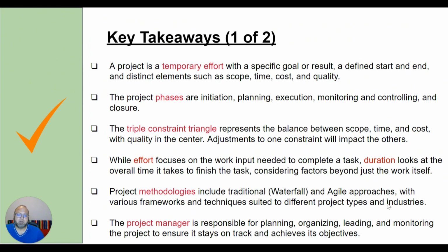Because sometimes if it's a traditional waterfall where you are just moving application A to application server A to server B, it might be easier to do a waterfall than agile, because agile is all about feedback. So if you know you're going to move these 10 bricks to over there, then you're going to do waterfall. Why would you do agile and get feedback?